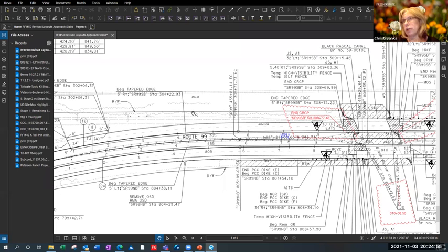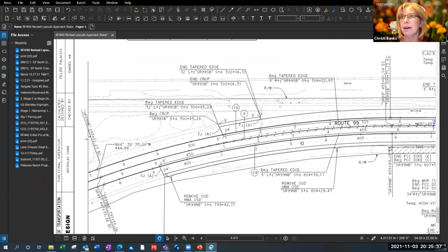No, I think it's a typical term that you'll hear out there. I did some consulting work on the high speed rail, and every property owner owns a different right of way. On the high speed rail, they were able to acquire certain right of ways, and Jared probably can appreciate this because his family has a farm out in that area. I don't know if he was affected by this or not, but some property owners allowed the high speed rail to acquire these right of ways and some didn't. So high speed rail said, we're going to start anyway without acquiring these right of ways, and they've been playing, what is the word, hopscotch to try and do the work. It's created so much inconsistency, and that becomes a real problem.